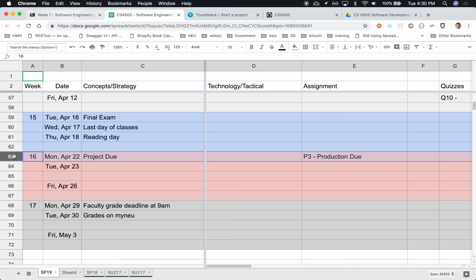And the team will need to put that in the plan, that I lost my UI person. I'm only going to have them for 70% this sprint because I'm going to have to lend my user interface guy for 30% of their time to help team three get up to speed on their piece, which is totally fine. That needs to be put in the plan. That's a very, very common issue in software engineering.